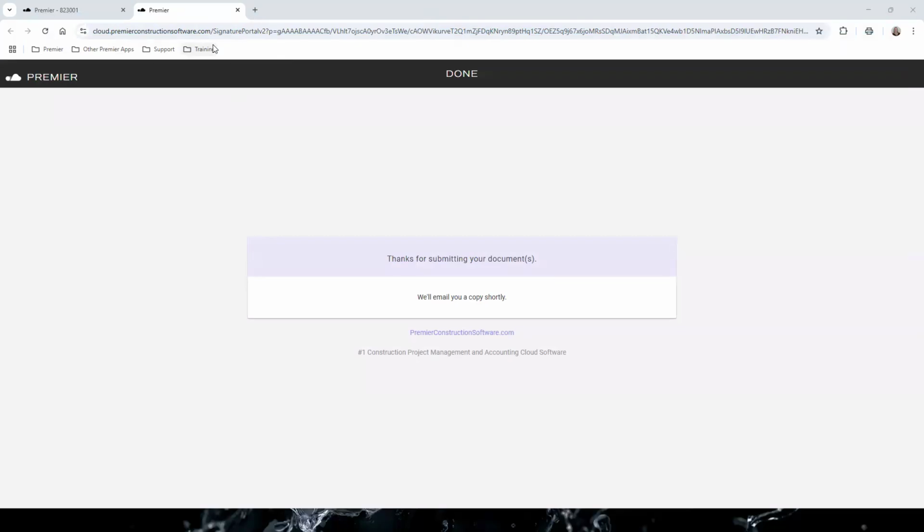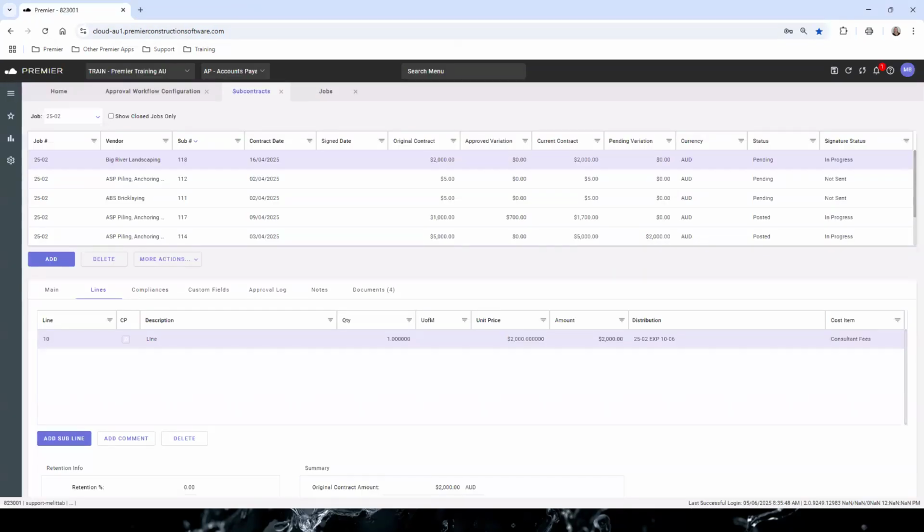If a contractor requests an amendment, how does that amendment get made? Emily, can you pipe up in here? I can indeed, all good. So when the contract was first sent to the subcontractor, or your vendor project manager, there was an option there to accept, decline, or offer revision. They would write something in there, might say, oh, we don't agree with how we're claiming it or something like that. That would go back to the project manager, and then the project manager would have the opportunity to update the lines or update the dollar figures or whatever it is, and forward it back out again for approval.